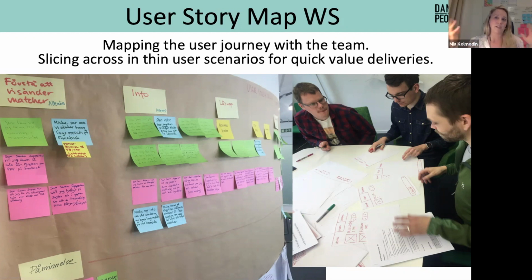We used, of course, 1 user story map, 1 backlog for 8 teams. And as you can see, you pull a line and you pull things above the line that you find maybe most valuable right now, and then pull down things, making a first draft of a plan. And then you can set your release goals and prioritize, and then create the sprint planning on top of it, where you pull up things continuously.